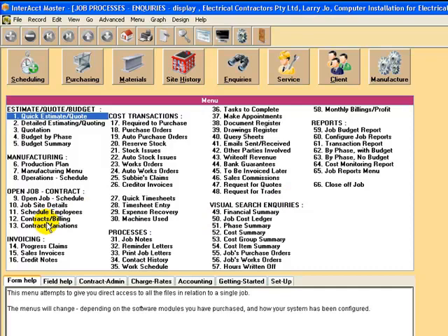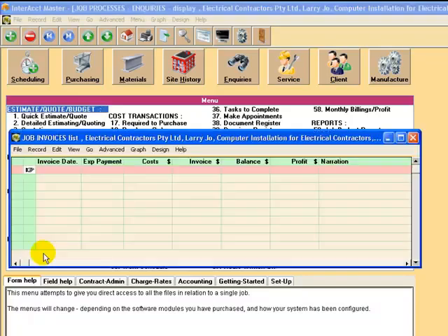Contract billing is where you can actually put in details of the contract and break that contract up according to the phases of work. You can record contract variations, print them out at that point too, and get approvals for various contract variations.